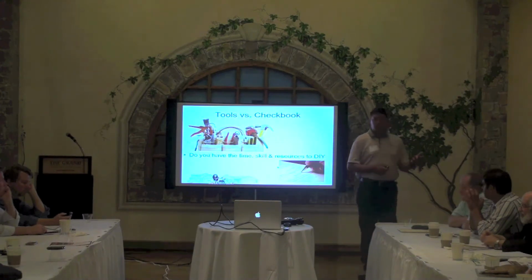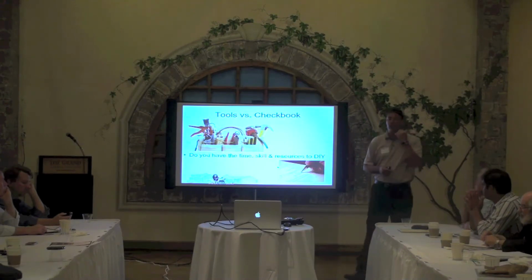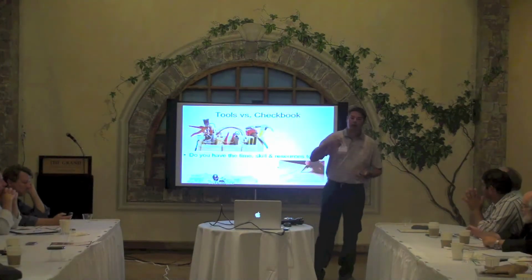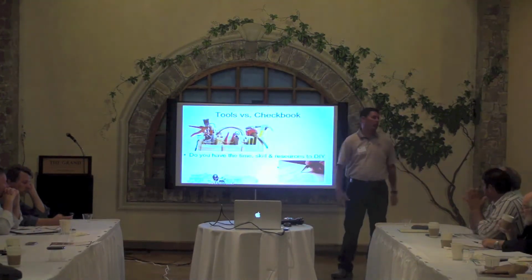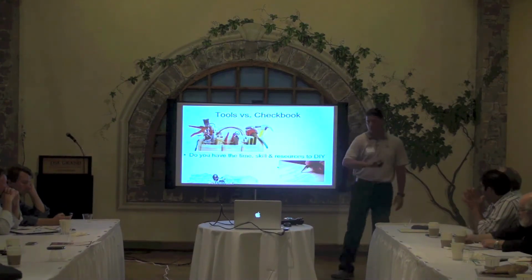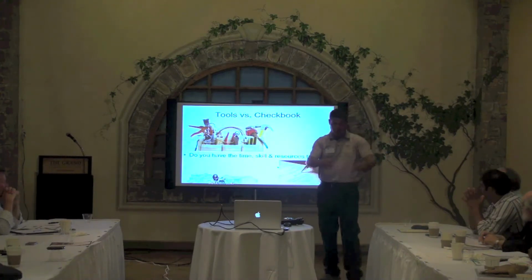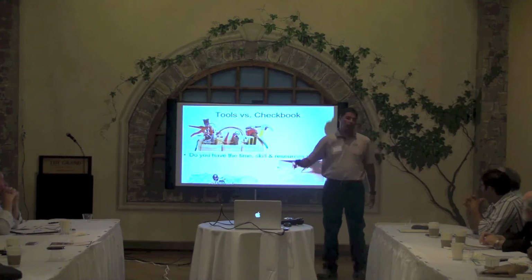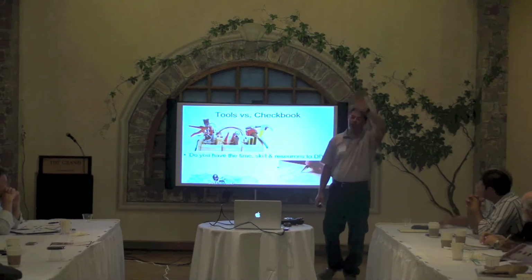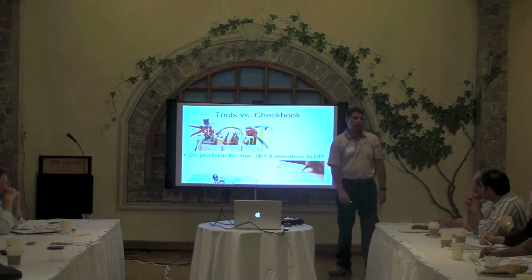I'll give you an example. We did a short sale on a house in Glendale that the building department overlooked this, I have no idea. They have a full set of plans. This is a $1.5 million house backed up into the hills, right in the middle of Glendale. Very beautiful house. The building department somehow forgot that there was a retaining wall that needed to be put around this property, because it's holding back about a 135-foot hill behind the house. Straight dirt coming down, right?